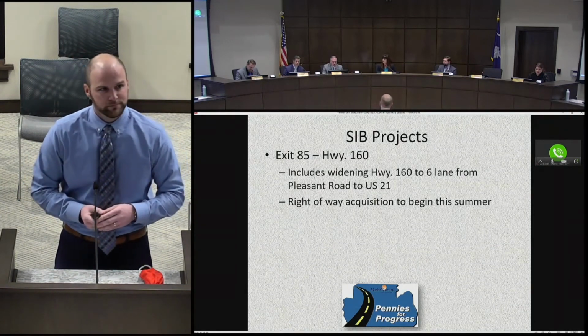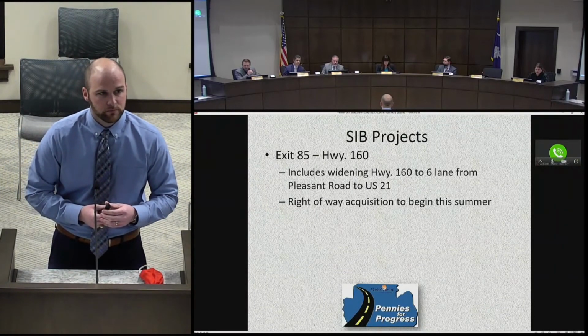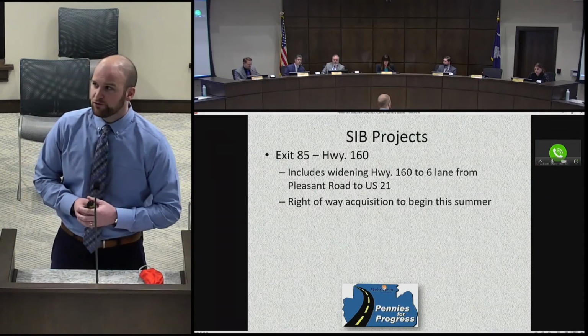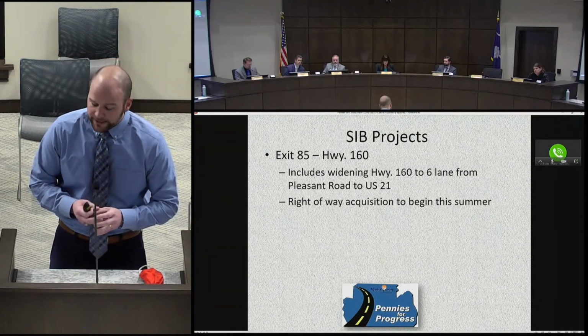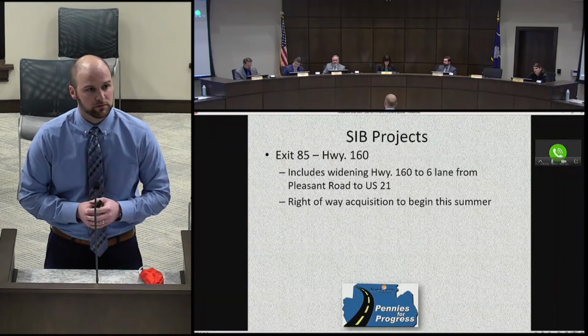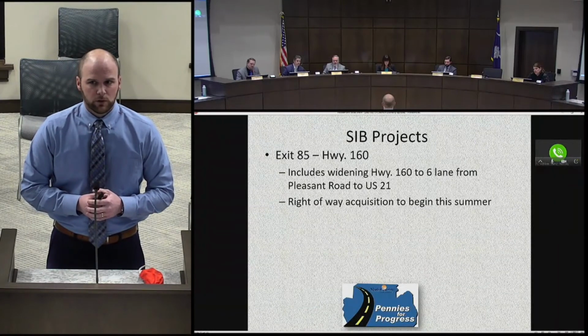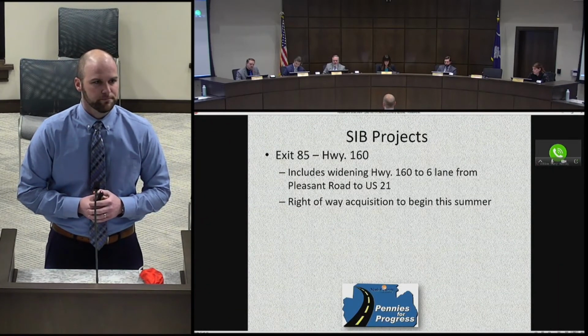Do we have a time frame? I know it says the acquisition this summer, but a time frame for completion of that? I believe construction will start, last date I heard was late 22, maybe early 23 to start construction. Okay. And then roughly a year project or 2 years? Oh, that'll probably be at least 2 years. 2 years?